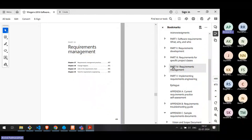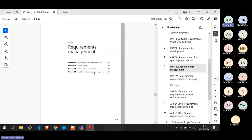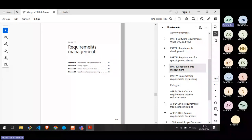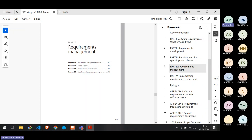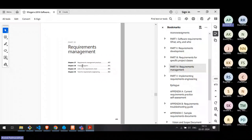The other aspect is management of requirements. Requirements are hardly static — a project starts with a certain set but market dynamics and customer needs change. Management is about how you handle changing requirements: controlling changes through change requests and approval processes. Many requirement management tools exist — SAP, Microsoft, IBM all have tools — along with many processes to manage and version requirements and communicate changes to users and developers.